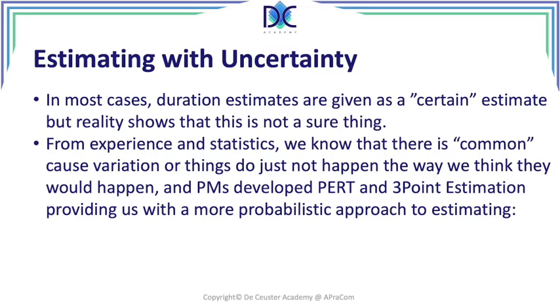Now, looking at statistics, the project managers were looking at the typical evaluation of the project. They saw that the project was evolving in a certain way, and typically they identified that the duration or the finances are in fact following a beta distribution. And based on that, they created an estimation technique which we call PERT, and that's where we have the PERT diagrams from. We calculate an expected duration and a standard deviation.